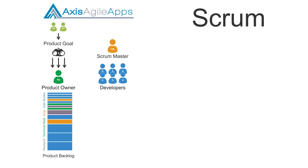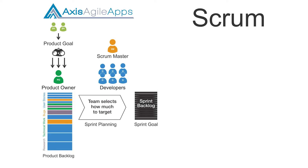Scrum calls an iteration a sprint, and a sprint is really just a time box — it can be anywhere between one to four weeks. Most Scrum teams follow a two-week sprint cycle, and at the beginning of these sprint cycles we need to determine what can be done within that amount of time. The developers are responsible not just for how the work gets done, but also for determining how much work can get done within a sprint cycle. This is called sprint planning.